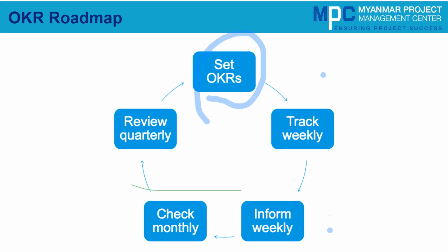Yes, you can. Especially the objectives. If you have a 3 months project with the clients or a 6 months project, you can put the objectives into the contract. And the key results are a little bit like the deliverables in a project, right? So what you define, what you have to deliver to the client or your partner has to deliver to you, are the key results. So you can use the same methodology.